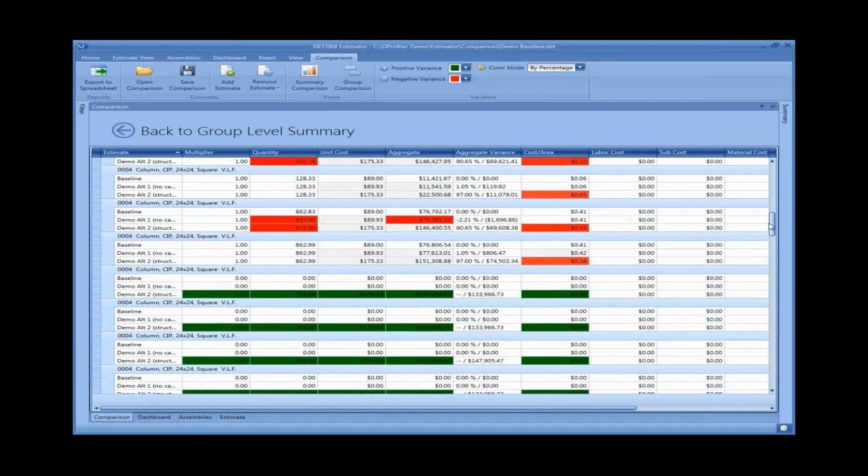We heard a story from a customer who had a project where they were using this, and they did a traditional variance report where they were looking at totals. And in their baseline compared to their third estimate, there was no variance. When they ran the variances inside Estimator and they looked a little bit more detailed, what they actually found was interesting. And that is, in the baseline, they noticed that as a percentage of the total cost of the project, their curtain wall line item was a big factor.